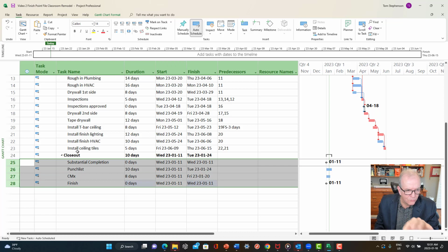So the nice thing is when you created a heading, then you can zoom in on that piece of work, right? The idea of creating a work breakdown structure is you don't miss stuff because you got headings that helps you to organize stuff. Because otherwise this project is so encompassing, you miss whole areas of work potentially. Also, you may need to consult different expertise to be able to do this well.